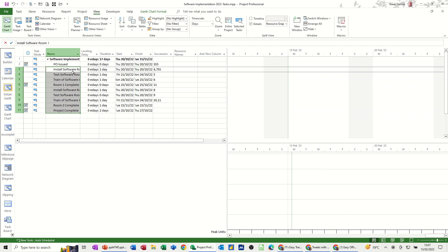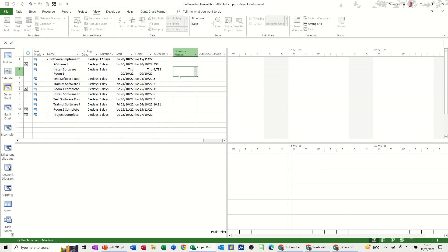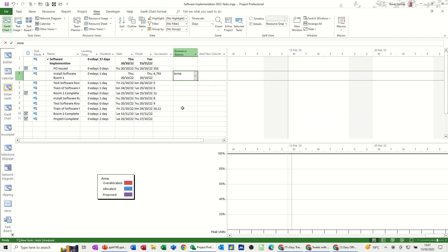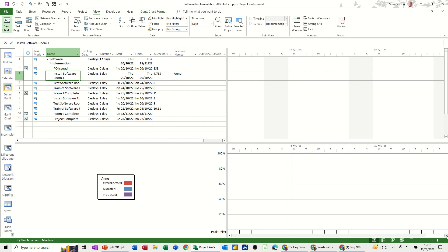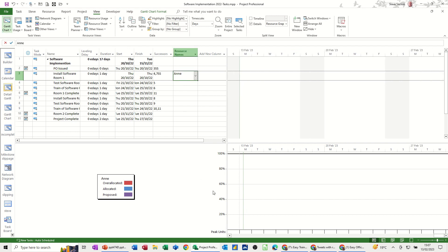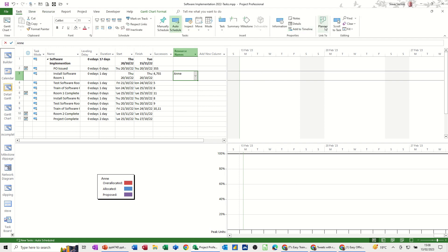So as soon as I start allocating resources I'll just allocate one person and now Anne will appear for this task the 20th it starts so let's just scroll across so we can find it. I'm on Anne. Now she's not over allocated so she should just be green so I'll just use this scroll to task to bring that into view.